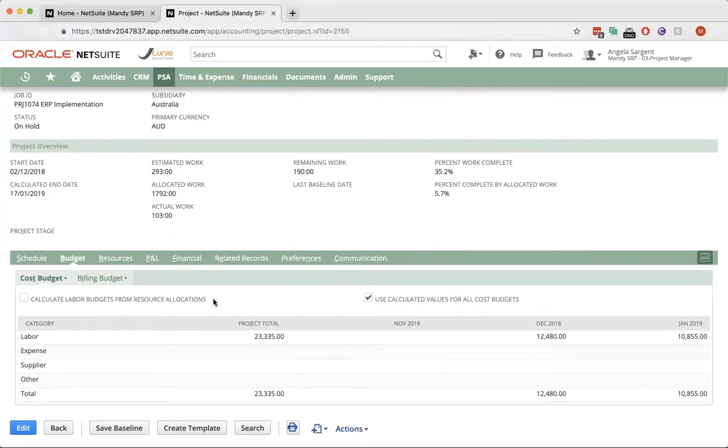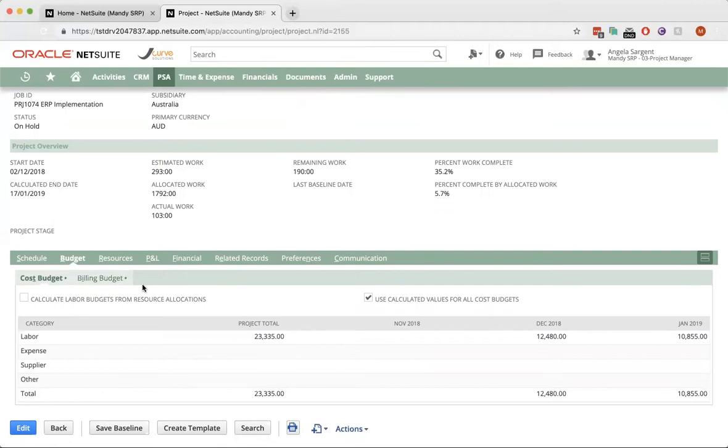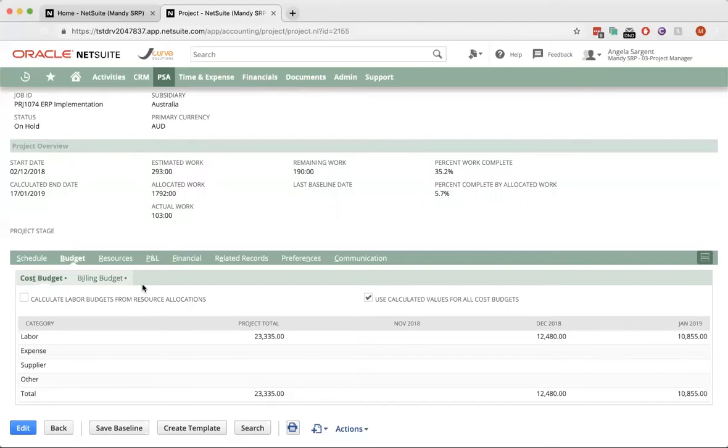I see that NetSuite manages multiple project types. So, I'm assuming these projects can be both time and materials and fixed bid? That's correct. NetSuite supports different billing options. You can have a mix of fixed bid, milestone billing and time and material billing.